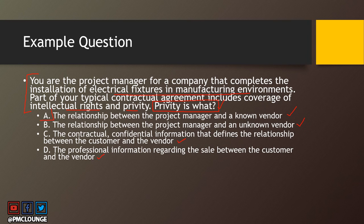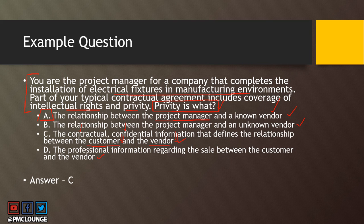If you think the answer is (a) you are actually wrong — the correct answer is (c). The problem with answer (a) is that privity is not necessarily a relationship between just the project manager and a vendor. The relationship is contractual, it is confidential, and it defines the relationship between the customer and the vendor — most likely between two organizations, not just the project manager of one organization and the vendor organization as a whole. So the correct answer is (c).